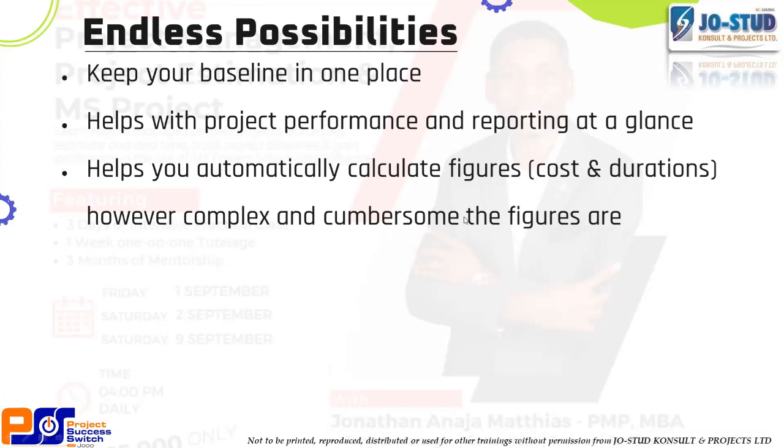So sometimes the fact that you have 300 tasks that has a duration of 2 days each, normally, right, you can just say 2 days by 300 tasks, I need 600 days. Sometimes it doesn't work like that. Why? Because some activities can be happening in parallel, right? Why some of them need to wait for others. For example,